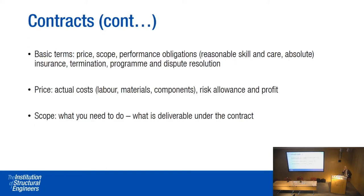Most contracts will have some basic terms: the price or fee; the scope — which is so important in contracts you enter into; performance obligations, including what level of skill is required; insurance, which will typically be stipulated; termination provisions, covering how you can exit and how the client can terminate your services; programme timing for delivery of services; and invariably these days, some form of dispute resolution as to how you can resolve issues that arise under the contract.